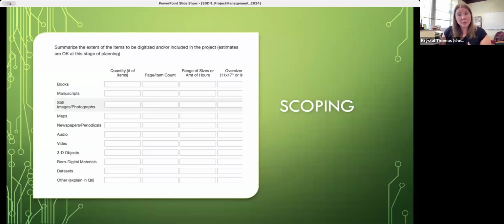Something that I've found that helps with that, if you particularly have a very enthusiastic stakeholder who just keeps bringing you things and is like, let's add this to what you're already doing, just put it with the other boxes, it'll be fine. Along with the not in scope note in the agreement or the project briefing document, I will put the steps that we could take if, during a project, someone has a great new idea or wants to do more work on something. I will put steps in and be like, okay, if that happens, what do we do?